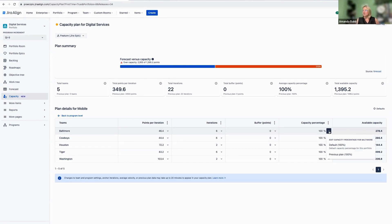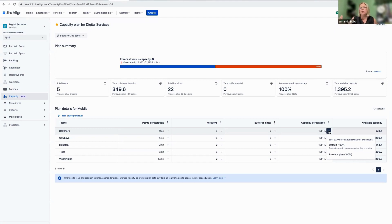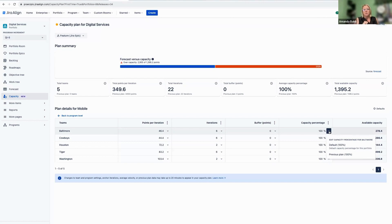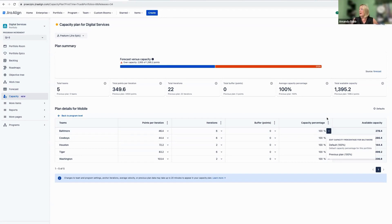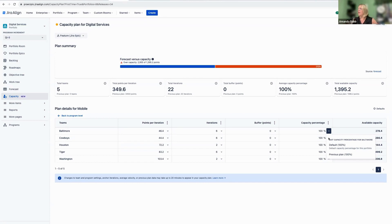And then last but not least, here's our capacity percentage. So capacity percentage is an interesting calculation that can give you the opportunity to state whether or not your teams are going to be working on 100% new feature and story work for the next PI. So in this particular case, for those of you that are looking for, well, what about defect work? What about keep the lights on work? We can go ahead and tune this capacity percentage down to what the actual historic percentages of our teams are for that bug work or for that KTLO, keep the lights on work may be.